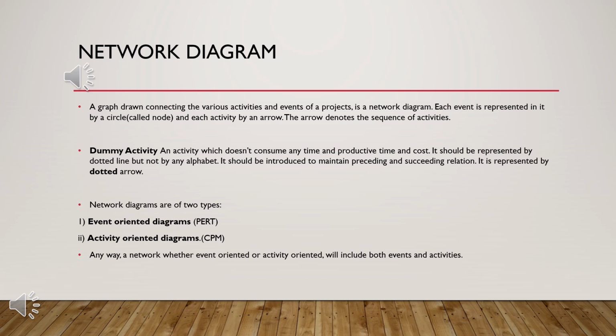Dummy activity: an activity which doesn't consume any time, productive time or cost. It should be represented by a dotted line but not by any alphabet. It should be introduced to maintain preceding and succeeding relation. It is represented by a dotted arrow.